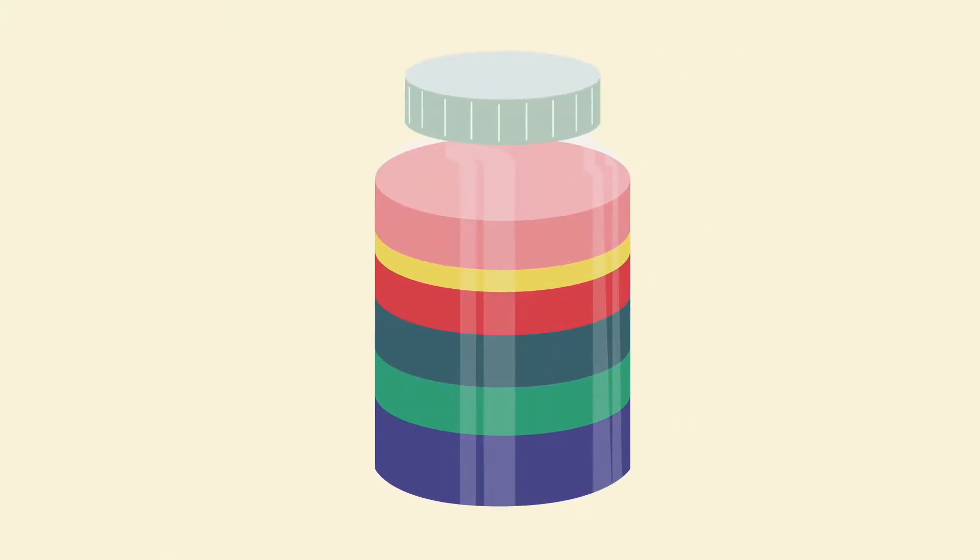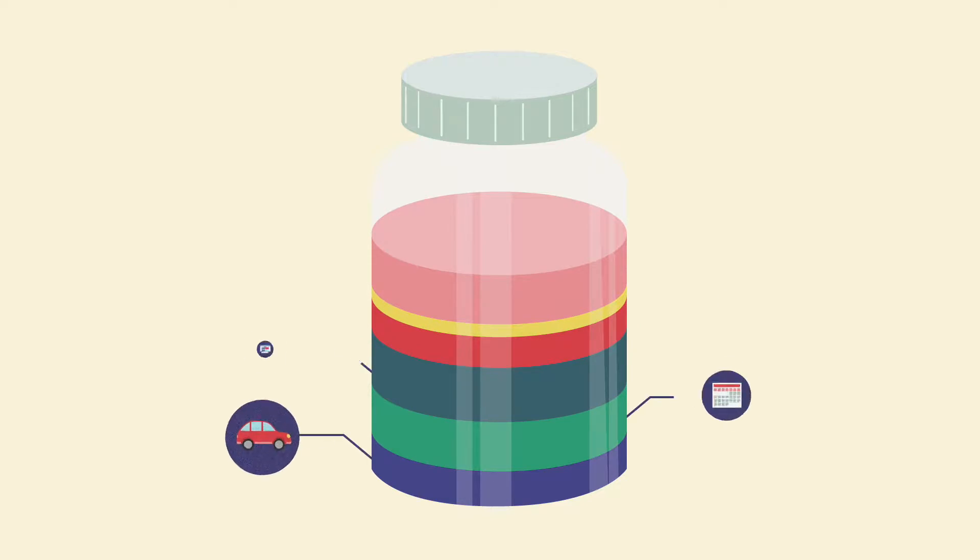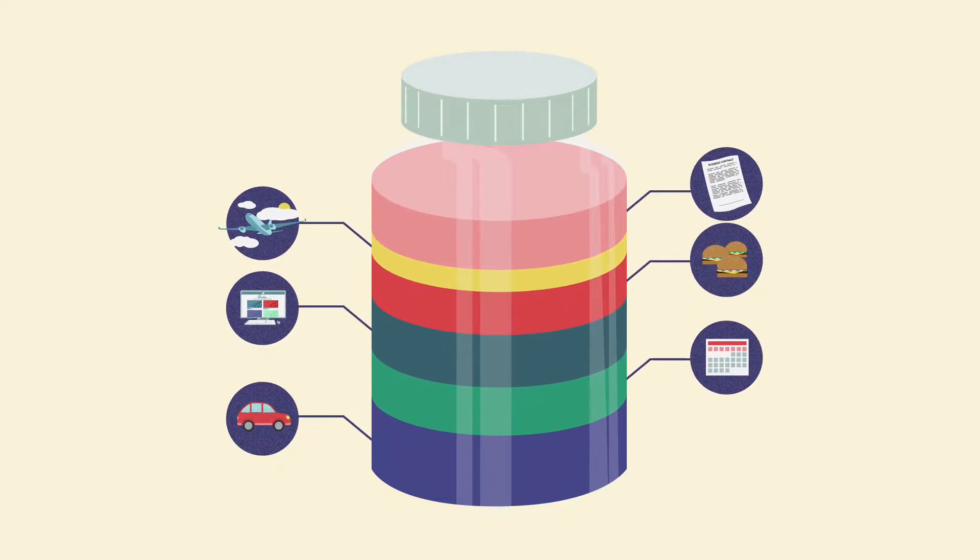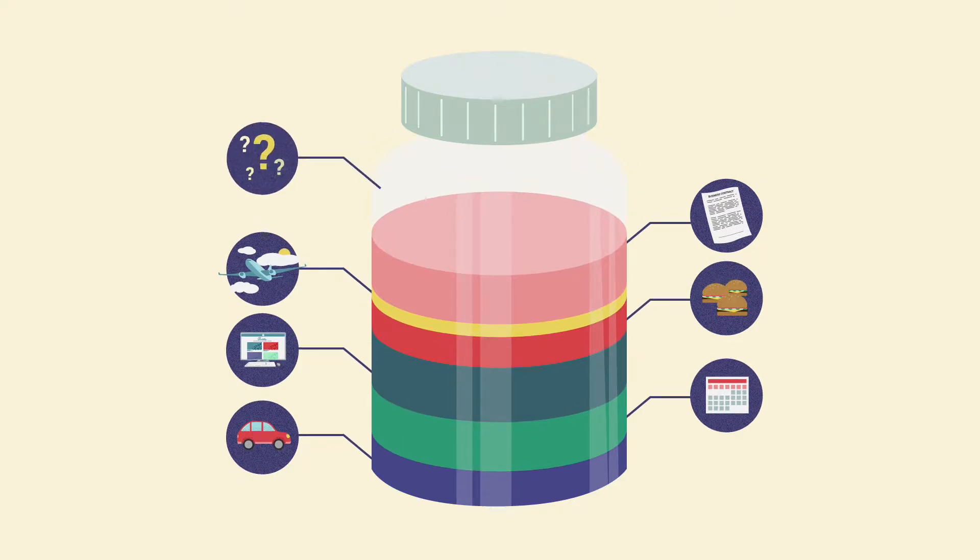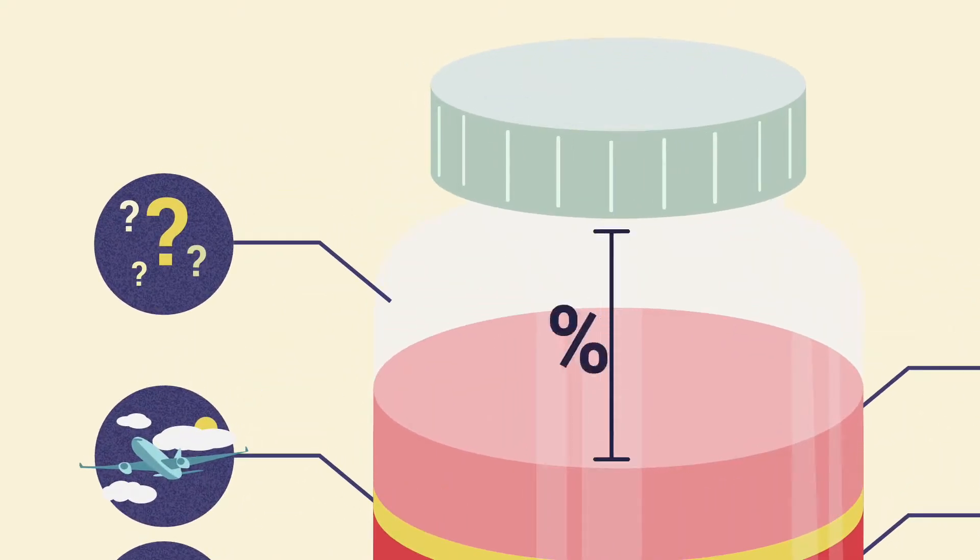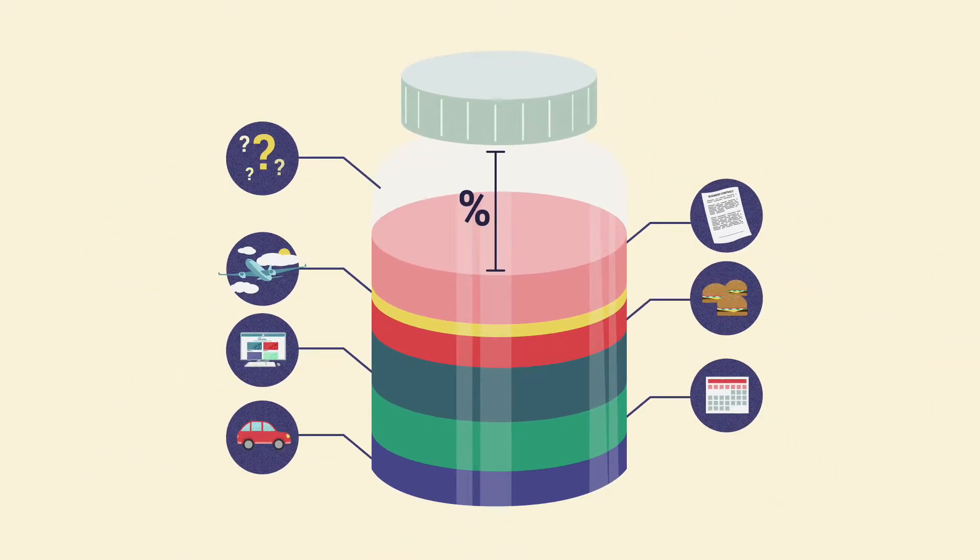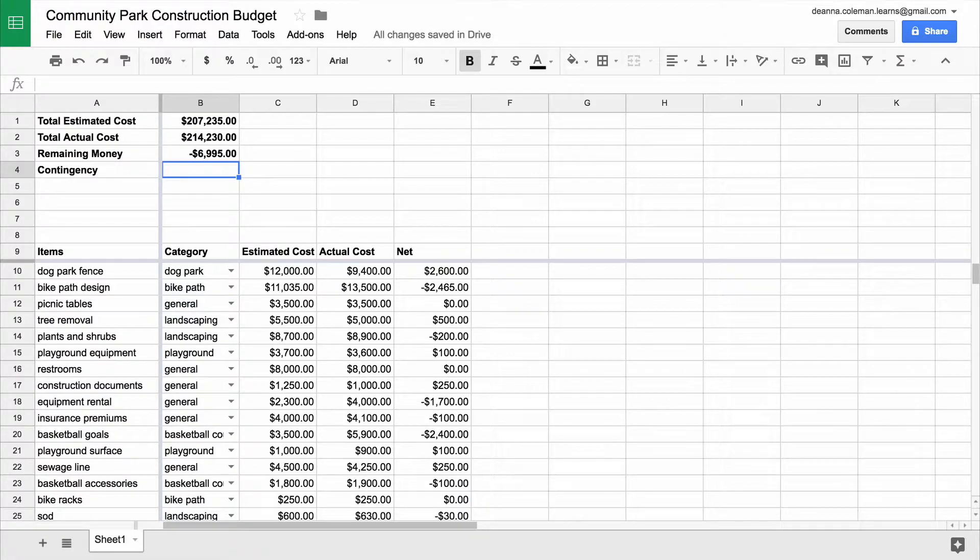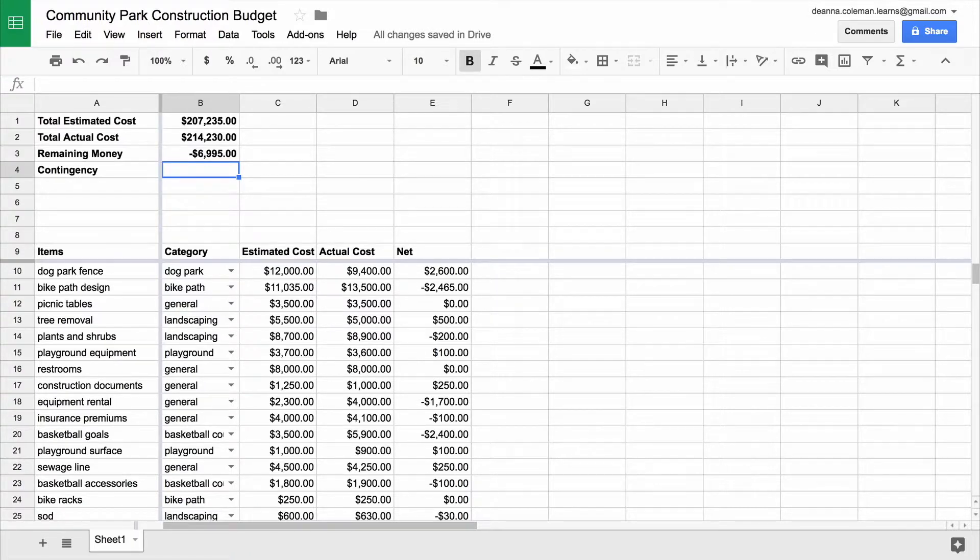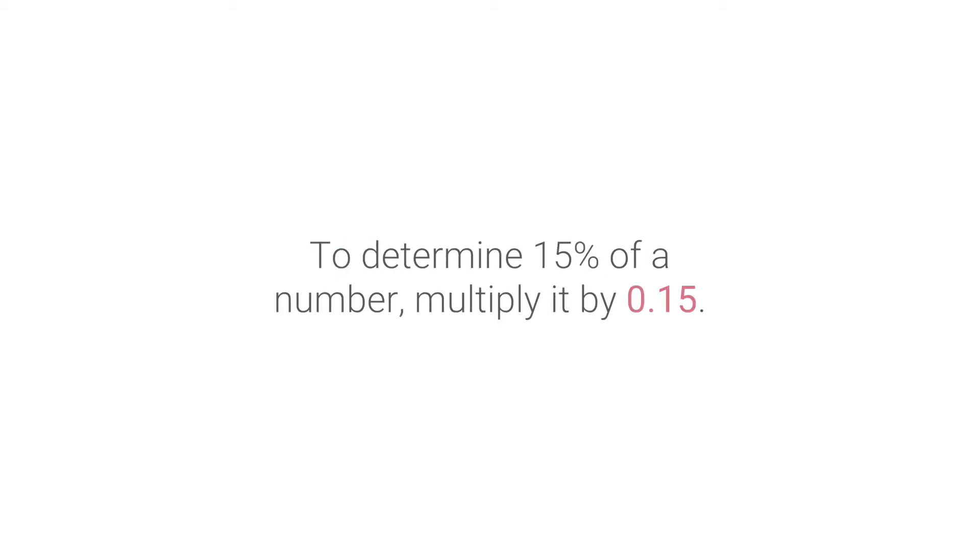Finally, add a contingency to your budget sheet. It is a good idea to leave room in a budget rather than trying to account for every dollar right away. This is called contingency planning. The contingency is a percentage of a total budget that is held in reserve for unexpected issues. Type a formula in the contingency cell. For your contingency calculation, use a multiplication formula. 15% is a reasonable contingency for many projects. To determine 15% of a number, multiply it by 0.15.